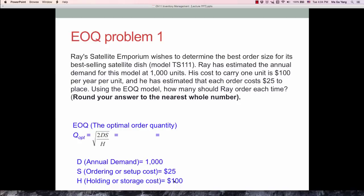Each component needs to be plugged in. So square root 2 times 1,000 times 25 divided by 100 which leads to square root 500. We need to round the answer to the nearest whole number, so 22.36 can be rounded down into 22 units.